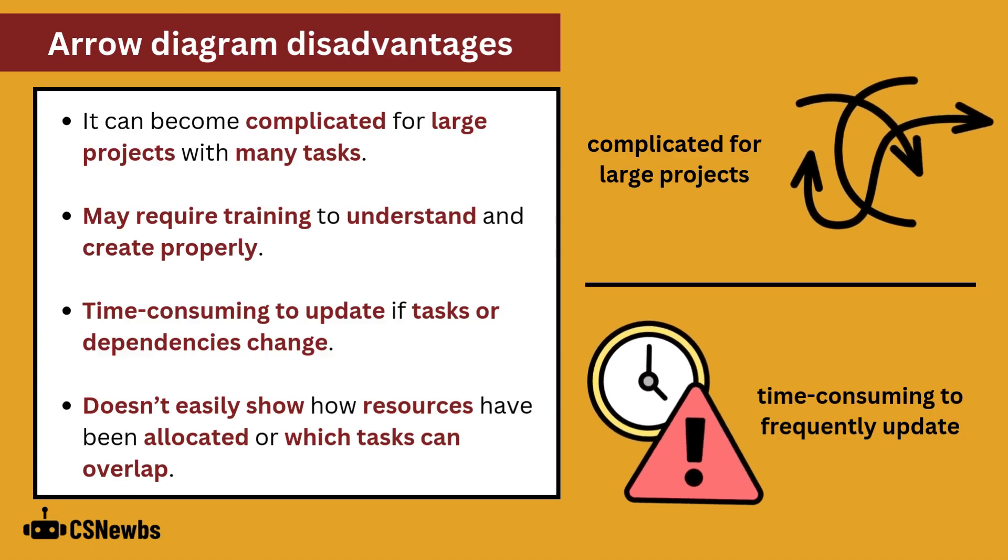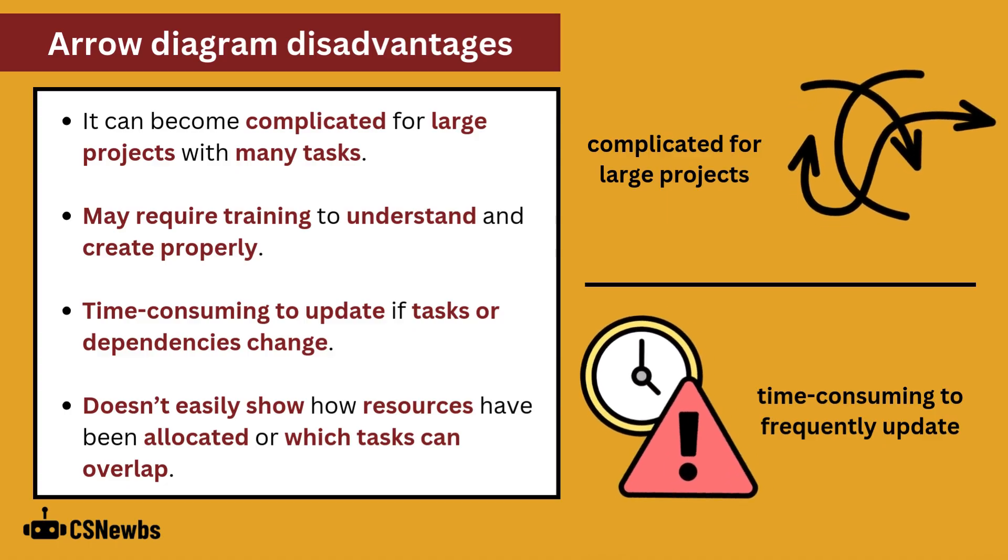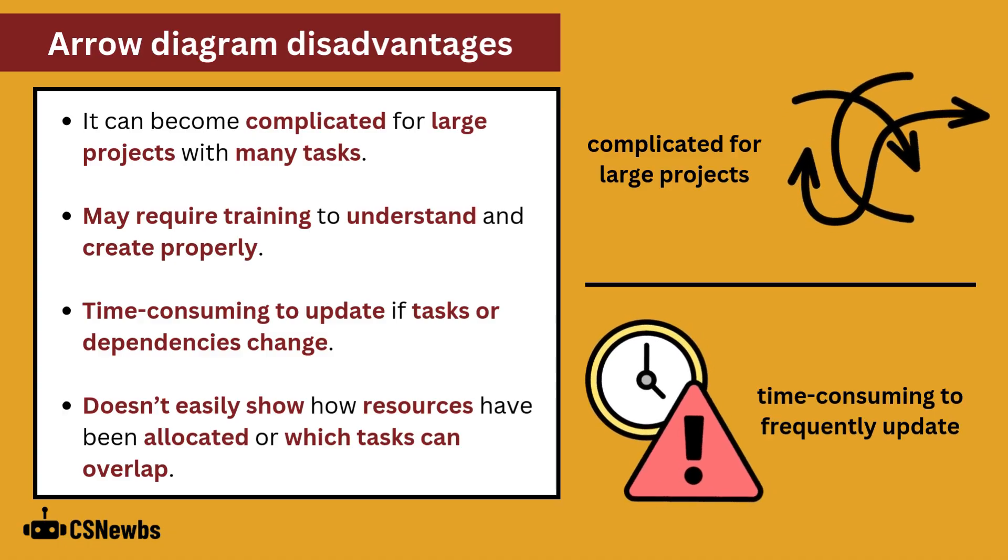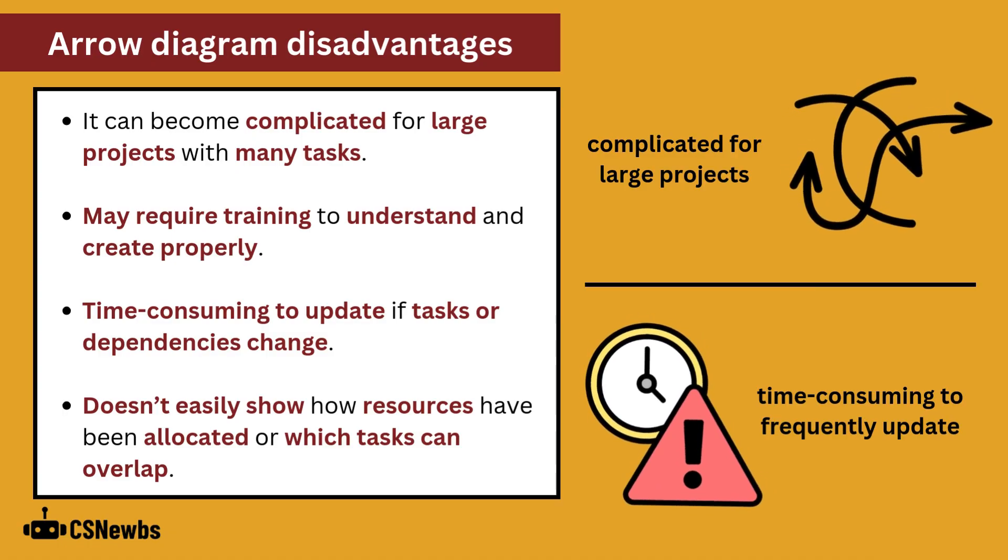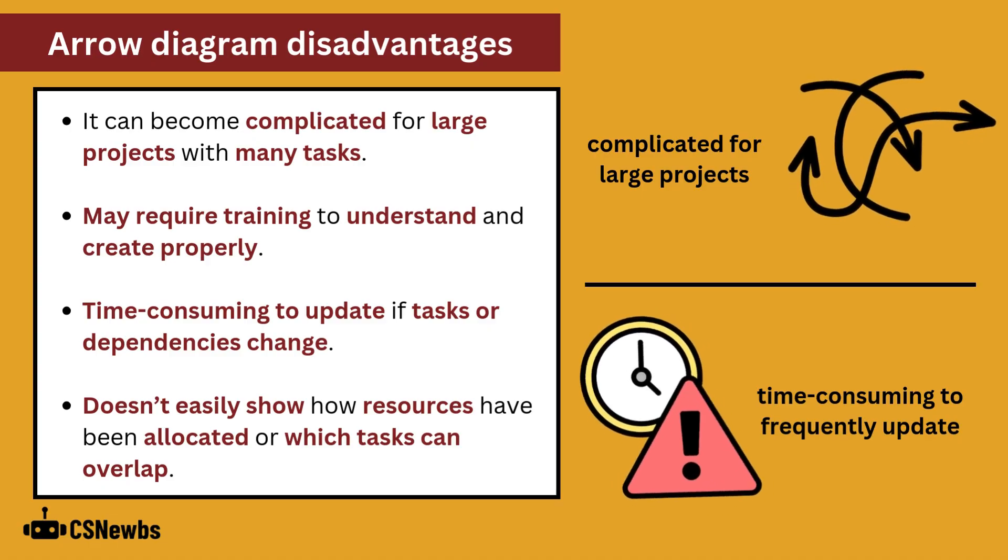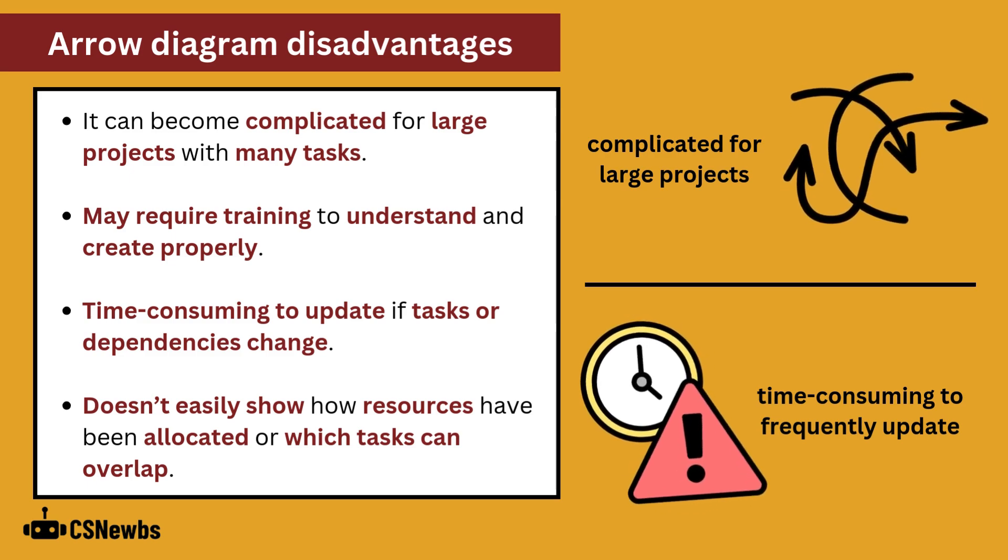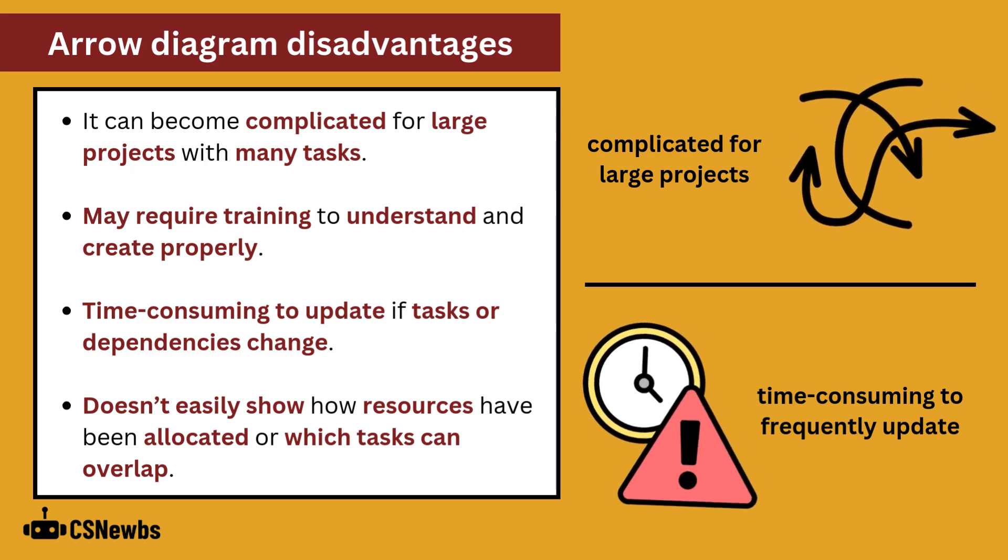The arrow diagram does come with disadvantages such as it being quite complicated for large projects with many tasks. It may require training to understand and create properly. It's time consuming to update if tasks or dependencies change and it doesn't easily show how resources have been allocated or which tasks can occur at the same time and overlap.